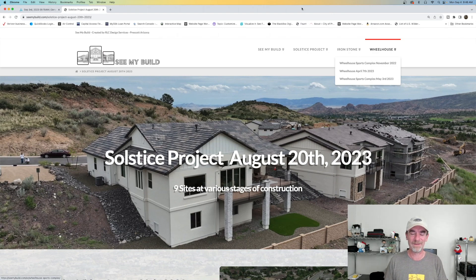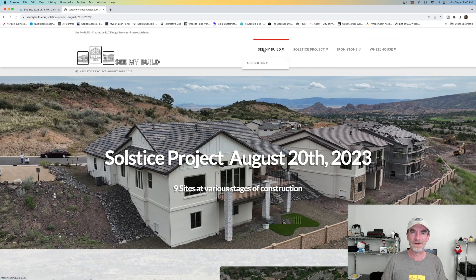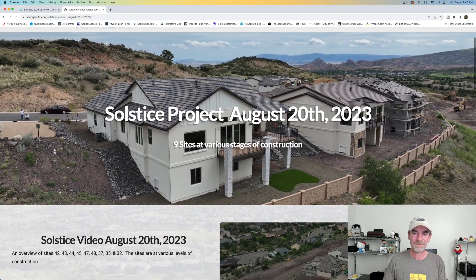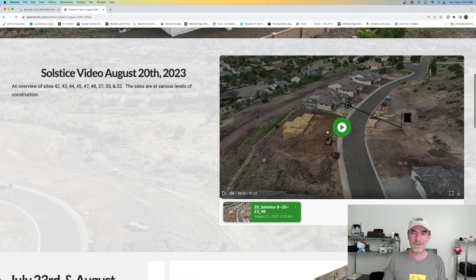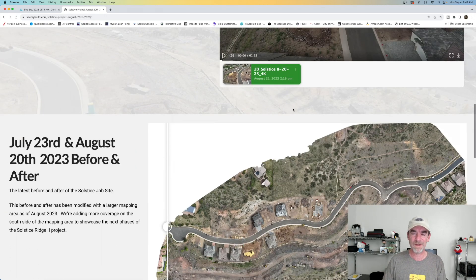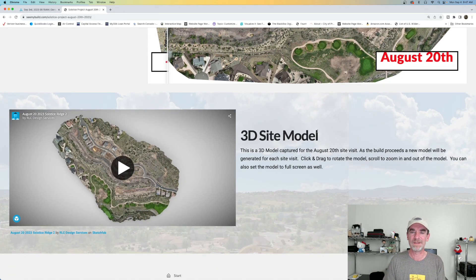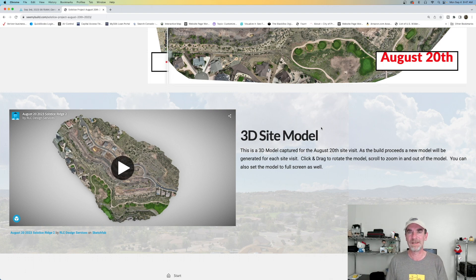In the first two parts, we talked about getting our images and video for one of our client locations, putting together an orthomosaic because we do orthomosaic before and afters. This is one of our deliverables that we do for our client regularly, twice a month. We do a static image from that day, video time lapses, and video fly-throughs showing the changes in the site. We capture several videos in the field and edit them with Final Cut Pro. We also do a before and after orthomosaic so people can quickly see what's changed, and we include a new 3D site model for each visit. We usually use WebODM or Metashape to put together both the orthomosaics and the 3D models.